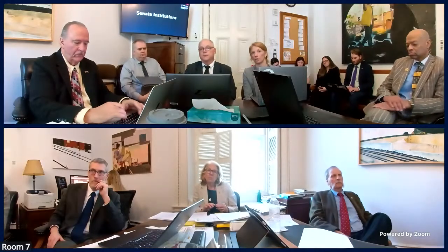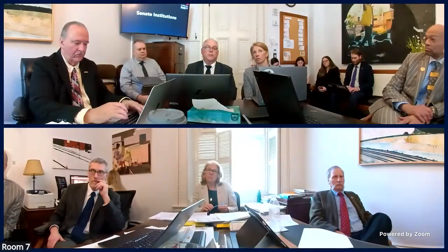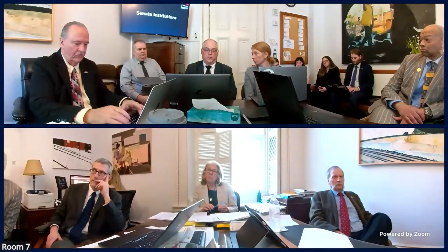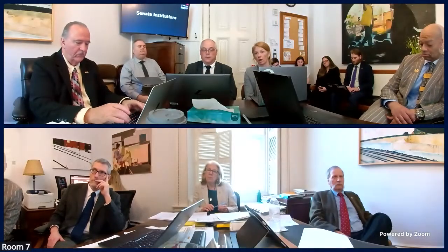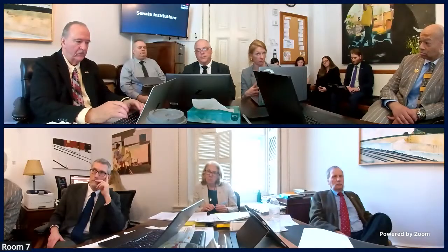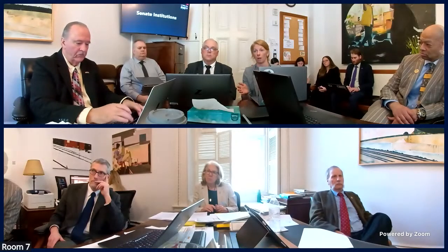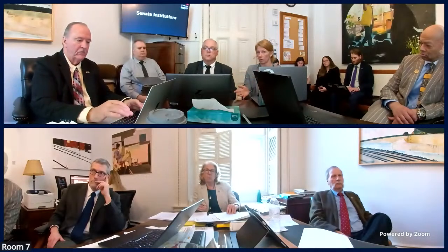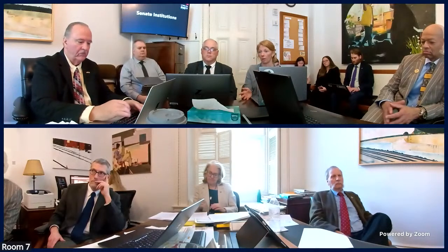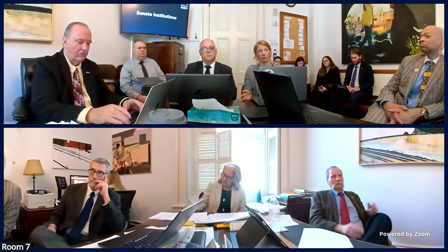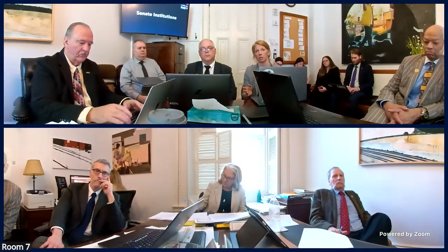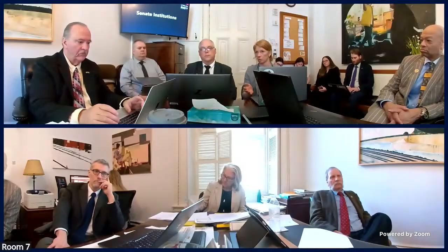And Joe, if I'm remembering correctly, there's a desire to pre-order here. Yes. And that's why, just from a timing perspective, we do believe we have good progress on the stormwater and we think there's a good path forward there. But additionally, we want to pre-order some of the equipment for this project. And we think that waiting, one, puts the overall timeline at risk as well as could present cost increases.